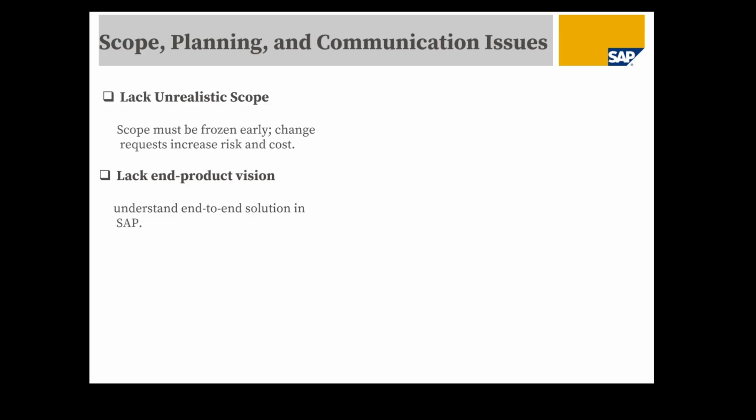Once you identify the solution, then the next question will be, how do you implement it? Your deployment strategy might include starting with headquarters and then rolling out to the specific sites as a global template option or as a site-specific independent option or even as a bulk rollout for sites within a specific continent. Let us discuss each of these options briefly.